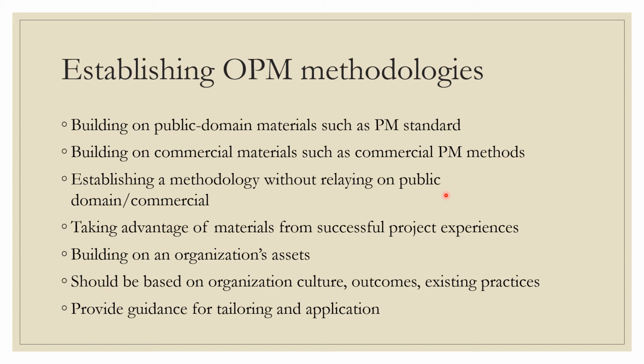It's a good idea to build on public domain or commercial materials, but we can also establish OPM without relying on any of them, purely based on organization culture and organization-defined methods, right? Another aspect is taking advantage of materials from successful project experiences. Take the lessons learned and success stories from previous history and data, and create and build the methodology on top of that, right? Building on our organization as such is one good way of building a methodology. It should be based on organization culture, outcomes, and existing practices.